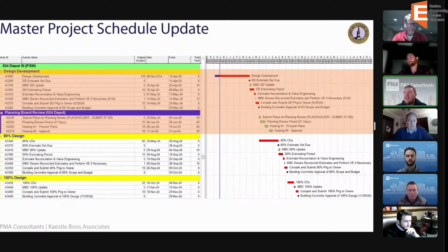We'll continue to show this in each meeting, highlighting this design development period since the successful vote, taking us all the way through really the end of May for the project scope and budget. The value management scoping exercise will take place along with that big final decision for this group: either splitting out the fire substation or carrying it as one package.